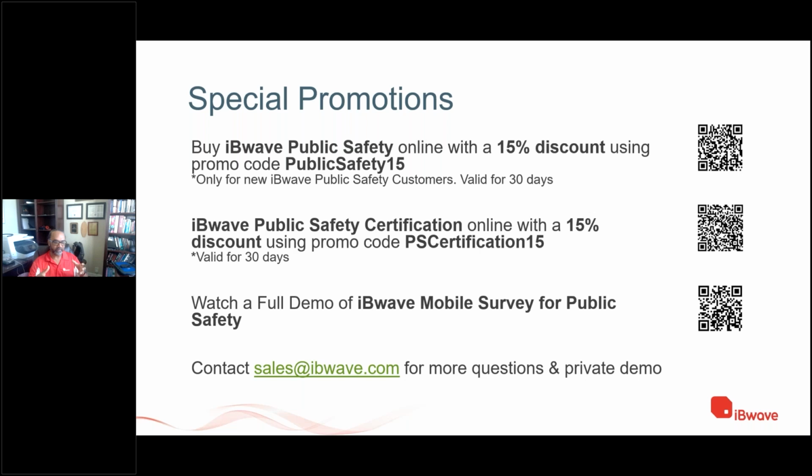Now, some markets and some AHJs have made a rule that every X feet you have to put an antenna. That's market specific. It's a very good question because every market and every AHJ makes its own decisions about what they want to see, since at the end of the day they will be using the system. So I always tell people, before starting any work, please call your AHJ and ask whether they have a different requirement. Do you want a 2 or 5 rated cable, or specific antennas or products? A lot of times they have tested something and prefer it. So please talk to the AHJ, because every market is different, and every requirement is unique.